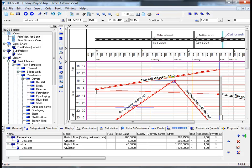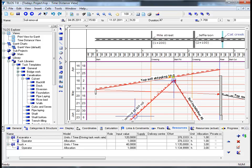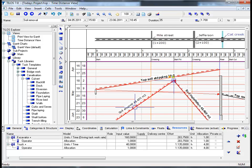Let's change some of the information to give you a brief insight into how this all combines. If we change, for example, the input value to 120 cubic meters as opposed to 160, we can see after we hit the return button that we only require 3 trucks now—beforehand it was 4. I'll just change it back to 160, and you can see that due to the increased amount of cubic meters, we require 1 truck more, in this case 4. I'm sure you've noticed that the plan in the main working area has also been updated accordingly.